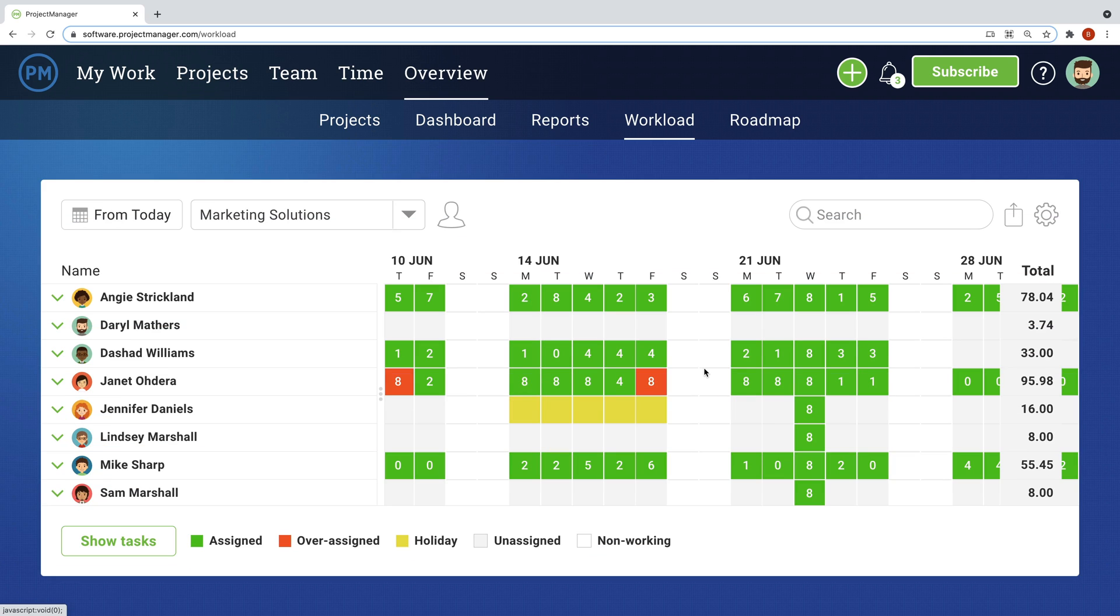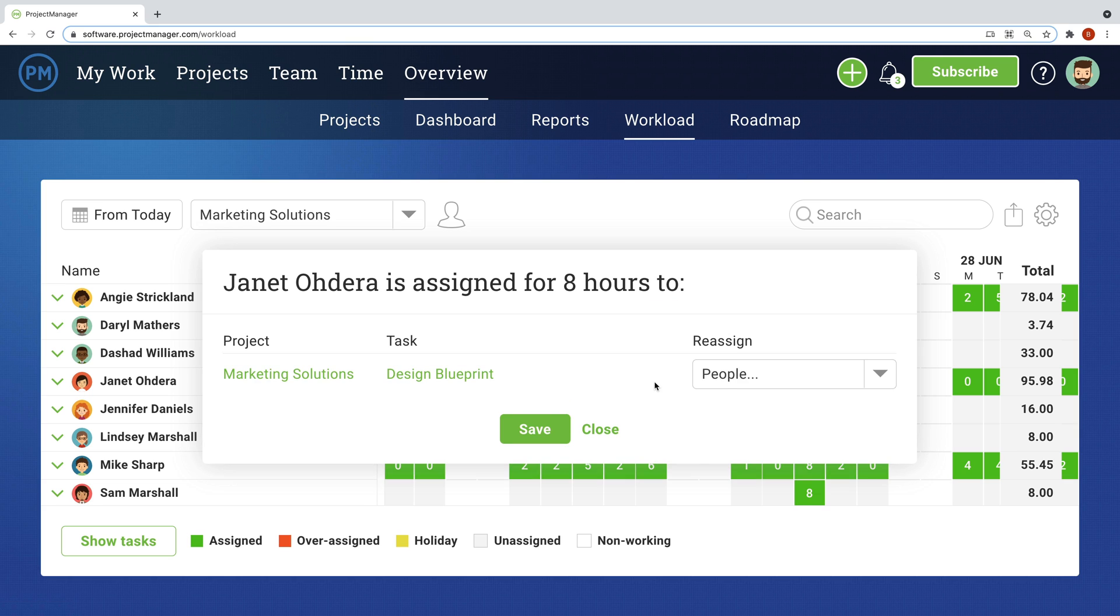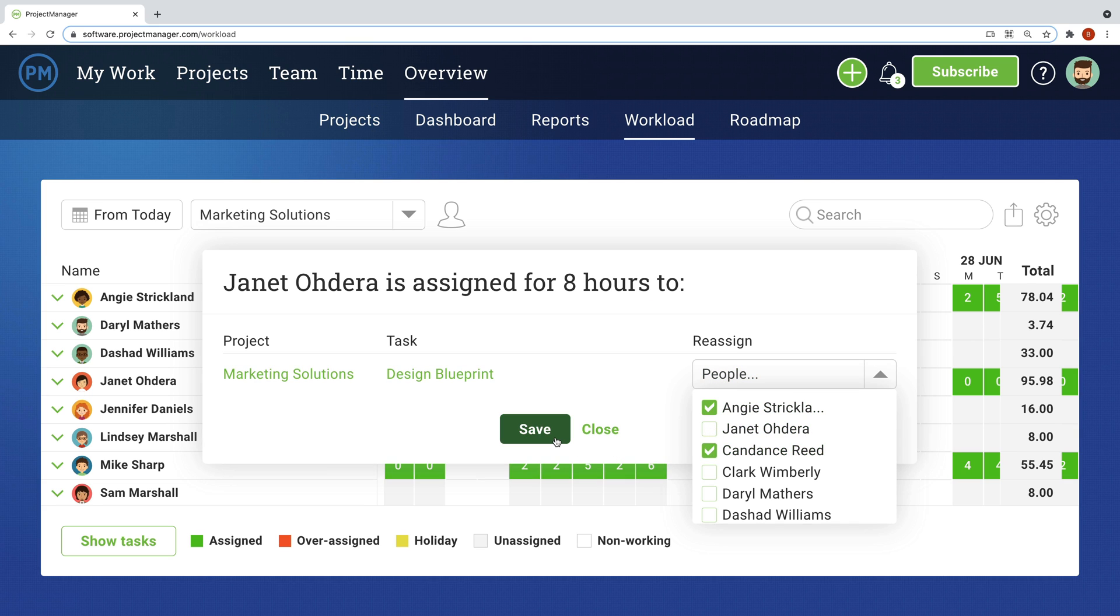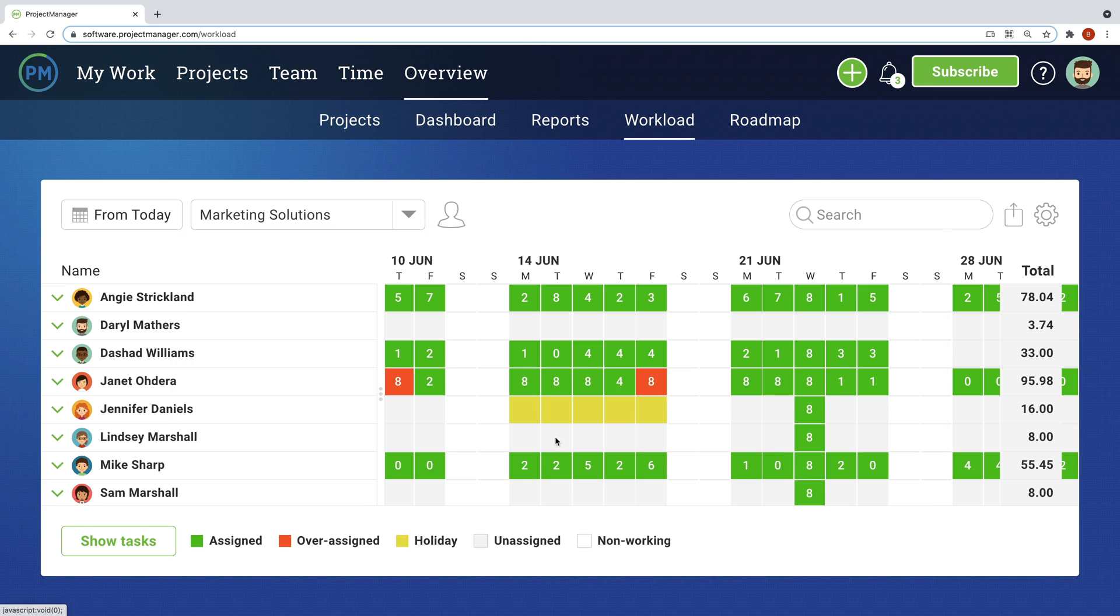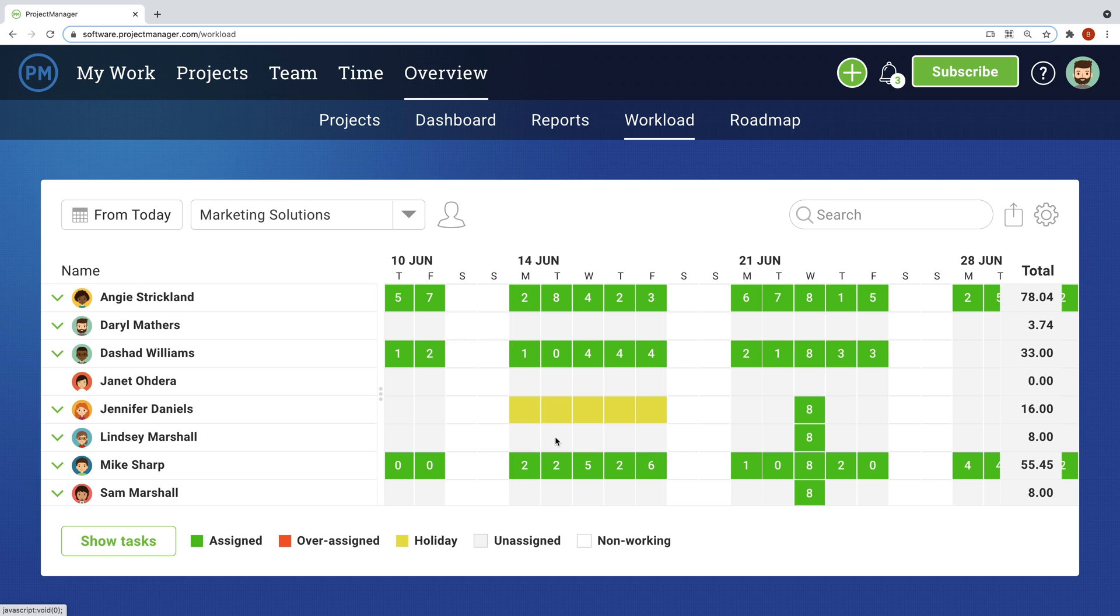In addition to powerful project and task planning tools, Project Manager offers robust resource and time management. The workload page displays estimated hours by team member, so you can always know who can take on more work or who is over allocated. You can even plan and reallocate hours on the page based on their calendar of availability. For example, yellow means that a person is on holiday. The workload page gives managers the visibility they need as they manage a portfolio of projects.